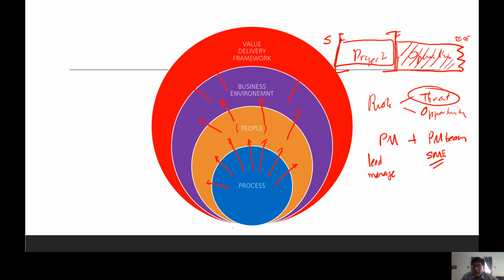So in projects, things that are new, you will expect a lot of uncertainties, right? Uncertainties breed risk. And risk is actually an event that may happen for good or for bad. So of course, we want to look at the bad: you will have a high level of threat risk in a project. And interestingly, threat risk decreases over time. So if I were to draw a graph, a threat risk being high here, it would reduce. As you draw to closing, the risk is over because you're handing over to the customer already, right?